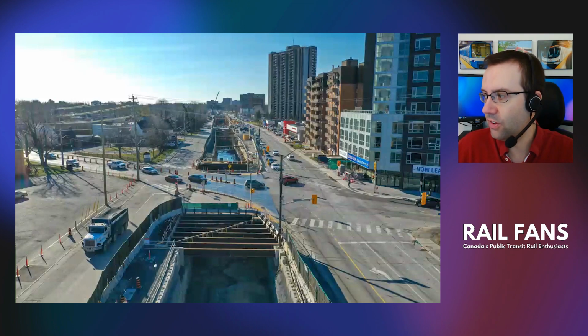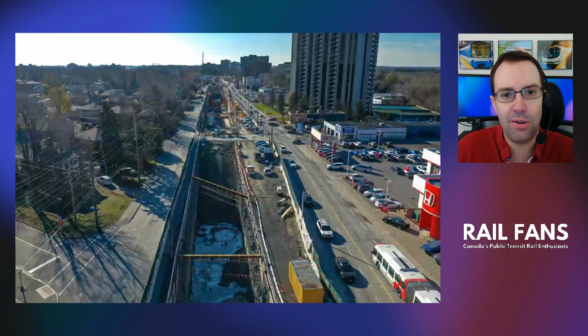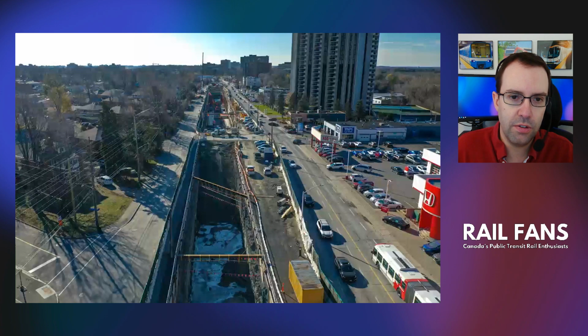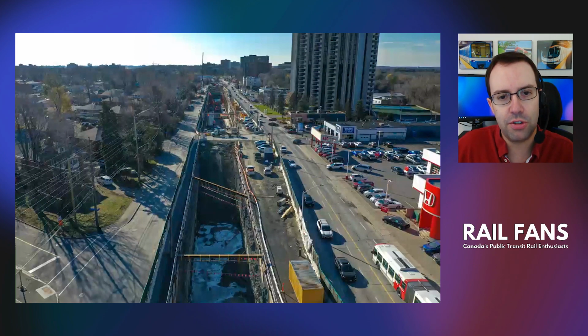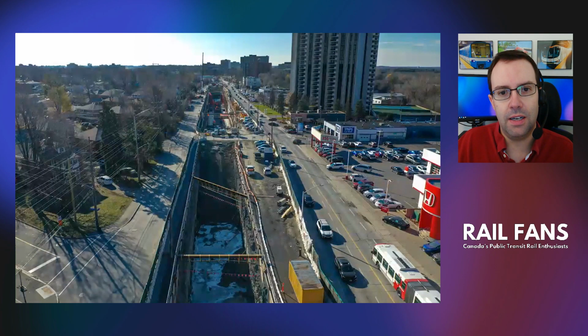As we continue farther, it just keeps going, right? Like it's amazing how much excavation has happened here in the last year, especially. So those little crossings that you see on the trench there, they look like little bridges or pipes and all that. Those are conduits. So either electrical. There was some major water mains that were relocated around here. Bell, Rogers, fiber optic, connectivity, gas lines, all sorts of things that need to be maintained, but present some challenge.